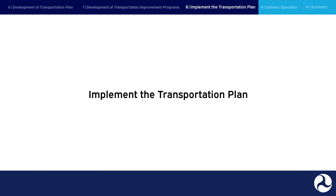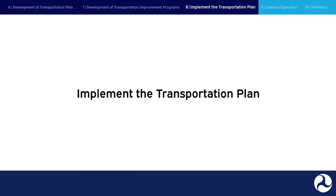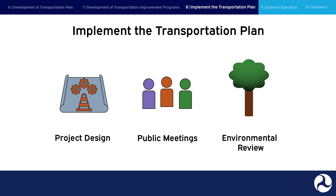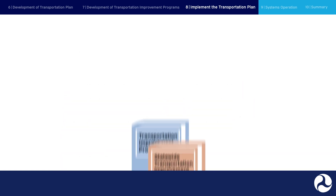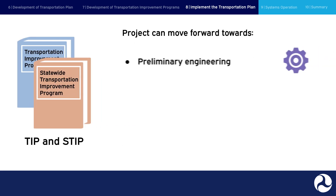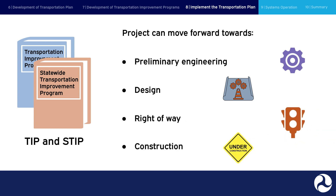Implement the Transportation Plan. Projects recommended in the MTP are programmed in the TIP for funding and then move toward implementation. Project design, public meetings, and environmental review take place as the project gains additional depth and detail in the development process. When the project and funding receive approval to be programmed in the TIP and STIP, the entity managing and building the project can move forward towards preliminary engineering, design, right-of-way, and construction. Contracting and construction practices vary between states, organizations, and municipalities, so you'll want to consult your agency's contracting and construction management guidelines for more information.